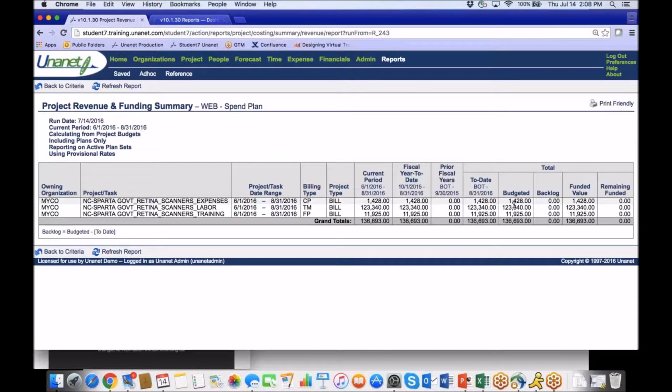If I pull in the total billable amount, it's either total billable amount or total value, I think it's billable amount here, even though it might be time and materials or fixed price, etc. Fixed price is going to be based on the fixed price setup, which you're billing out. Time and materials is going to be based on the labor billable amount, total labor bill.